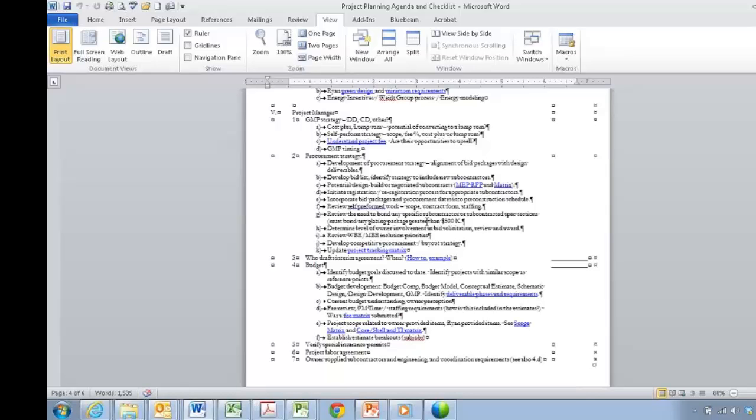That will then begin to prescribe the type of number and the trigger for when you will go to a GMP, or is it going to be a straight cost plus all the way through? It's very important that you understand that at the outset, knowing when the owner wants to lock in. And it's also very important on the external side and internal side as it relates to their financing. So all that factors into the discussion.